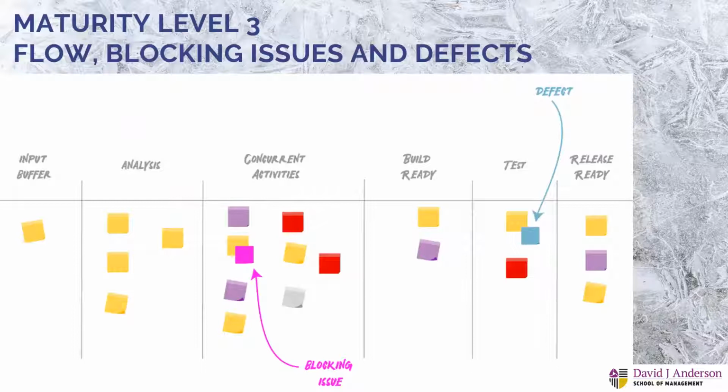What you should also visualize at this level are the blocking issues and defects. And again, it's important to measure lead time not only for your features, for your main items, value-adding items or primary items, but also for the blockers, and maybe the defects that are the blocker for you. So measure lead time for all of your items, because probably your defects will be a separate work item type and you want to show them separately to your customers.